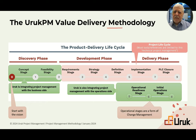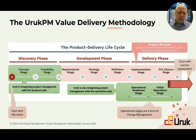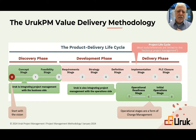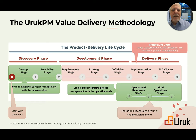Tailoring is a must to respect the diversity in how we practice project management. Moving from methodology to method requires tailoring, customizing, adapting, and configuring the method to be fit-for-purpose. When building a tailored method, we consider several variables. First, the project type and sector — under what we call sector, domain, and category. For example, sector could be capital project, technology project, or academic project.